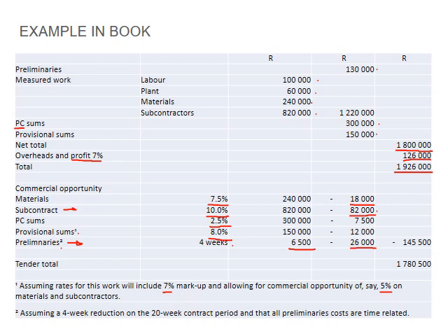So all these possible savings are added, and you subtract that from your contract amount. So effectively you are 145,000 rand more competitive towards your original estimate, and that is basically how you mitigate your risks. Okay, very simplified, but I think it does explain how you can mitigate or evaluate your risk to get a competitive edge during your tender stage, and the things that you need to consider.